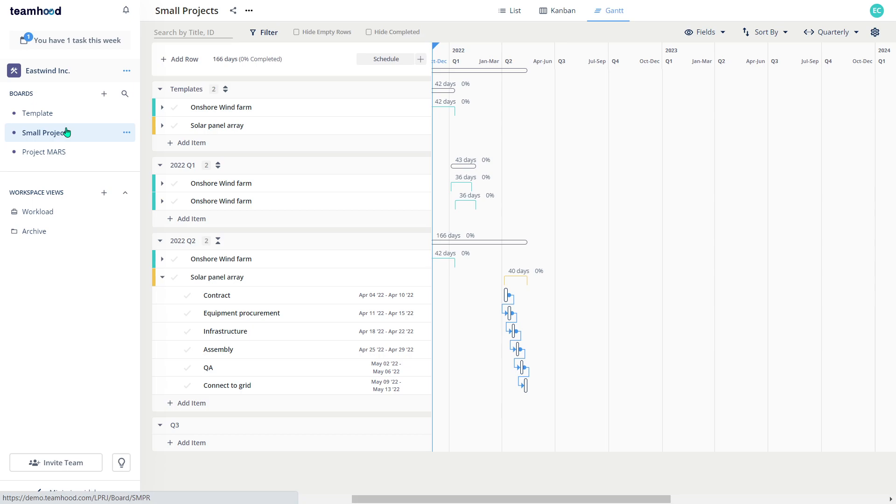And if you're going to work on a very large project which takes at least a few years and involves from 50 to hundreds of people, I would recommend taking one workspace per project. Because that's actually a project program probably which you're running already. And then inside that project program, you will still use boards as either the grand project phases or just projects in that program.